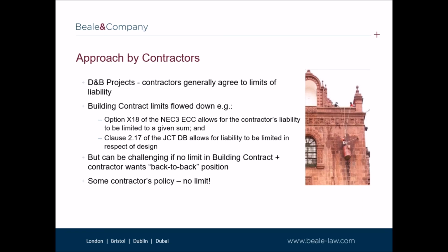Nevertheless, agreeing limitation clauses may be challenging if the building contract does not include any such provisions and the contractor seeks to achieve a back-to-back position. We are aware of some major contractors that are insisting as a matter of policy that limitation clauses are not included in their appointments.